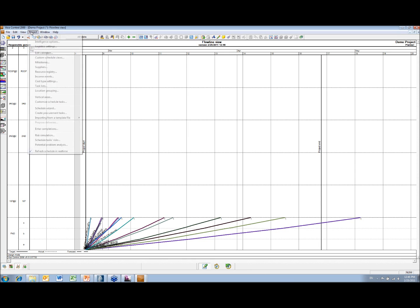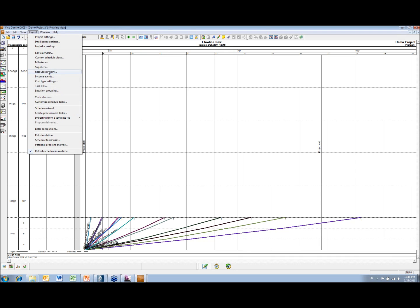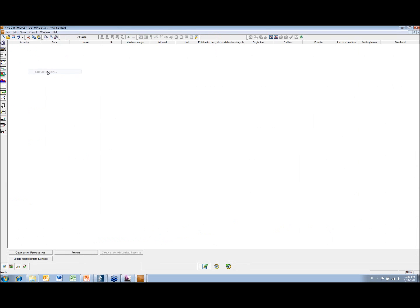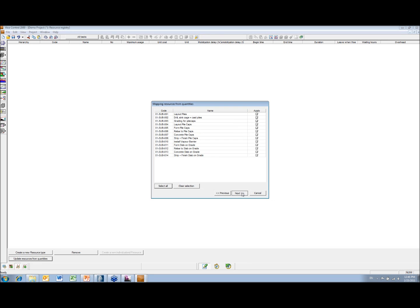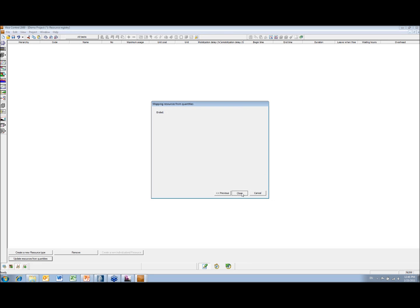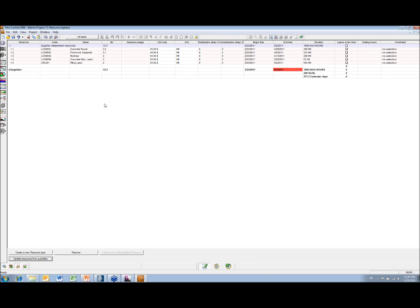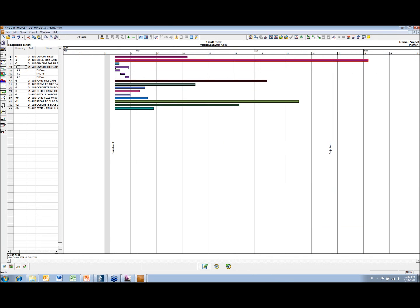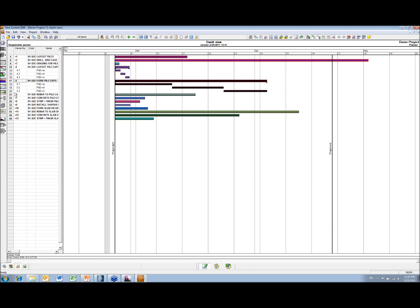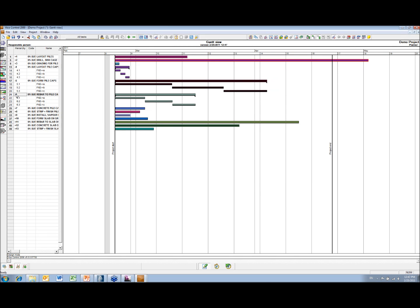So again, as we default, I'm just going to update the resources from what's in the estimate. And again, just so those who are more comfortable looking at the Gantt, that information is now there.